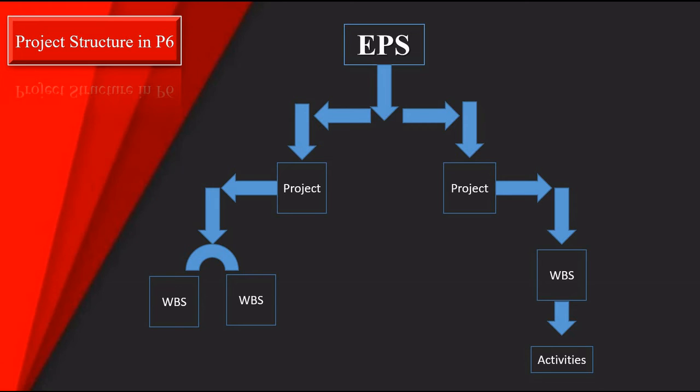Activities. WBS are further divided into tasks or activities. These are tasks that need to be performed to produce the deliverables. For instance, under the software WBS of a mobile phone project, we can have activities of writing code, testing code, etc. Activities can be further broken down into sub-activities if such detail is needed.